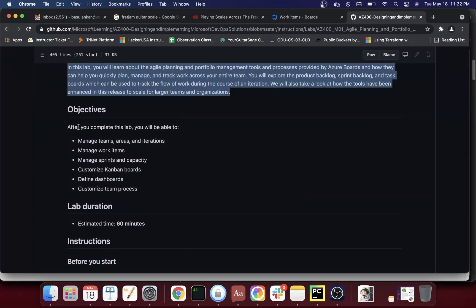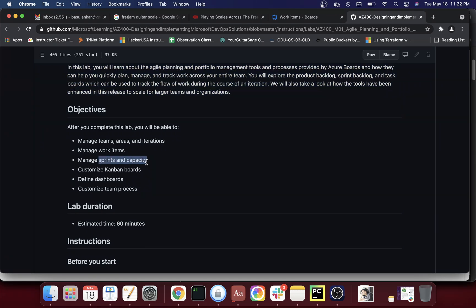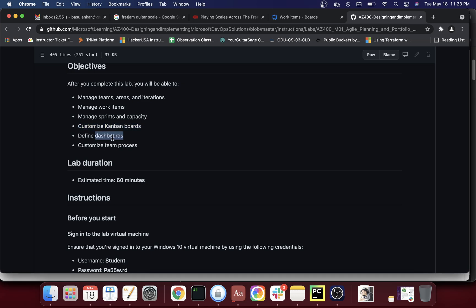There are a few objectives in this lab. Once we're done, we'll be able to manage teams, areas, and iterations; manage work items; and manage sprints and capacity. Sprints are typically two weeks, and capacity is calculated based on hours available — for example, two people with 40 hours each gives 80 hours capacity per sprint. We'll also configure Kanban boards and define and customize dashboards and the team process.